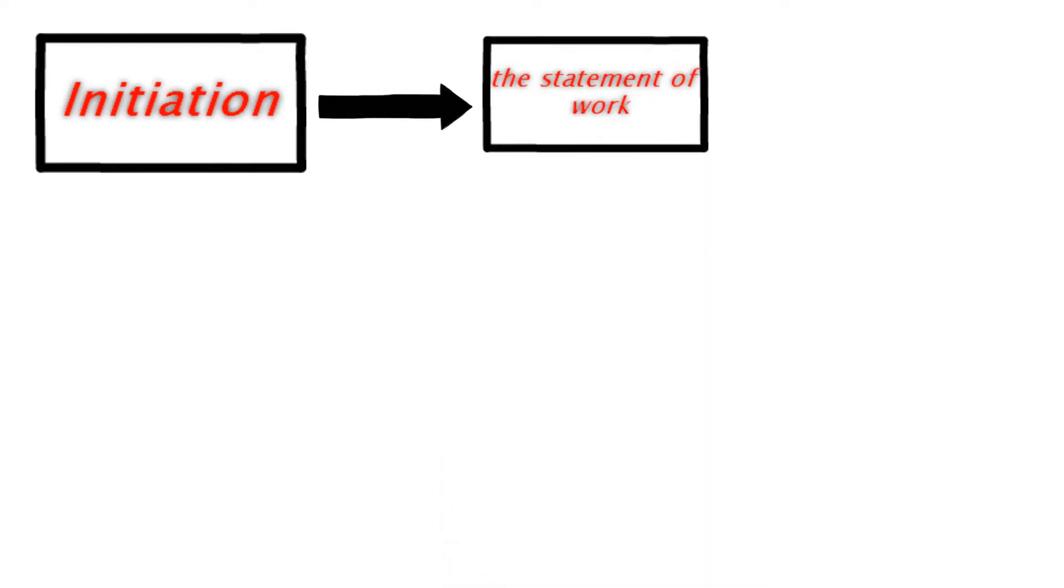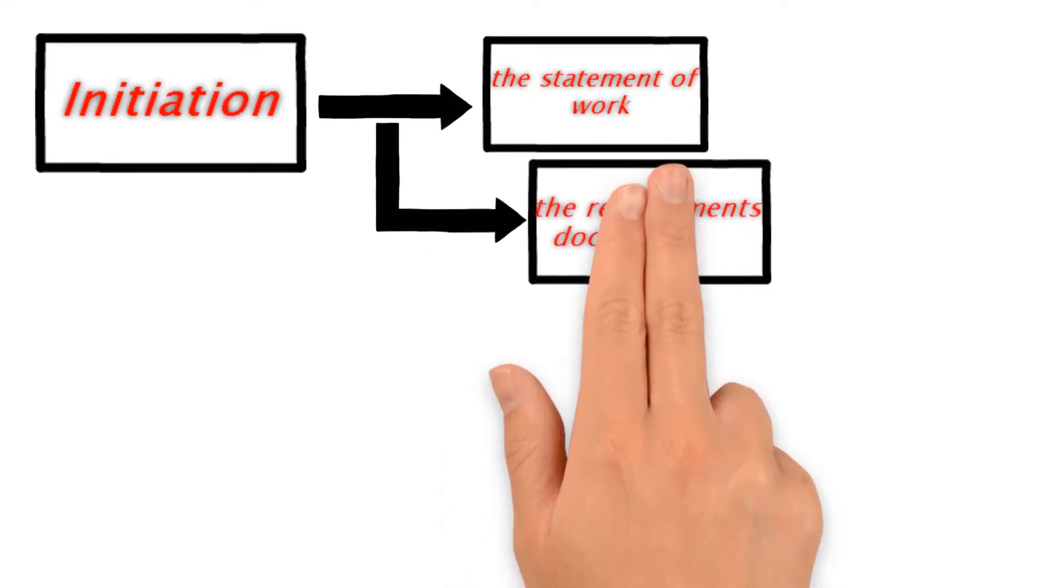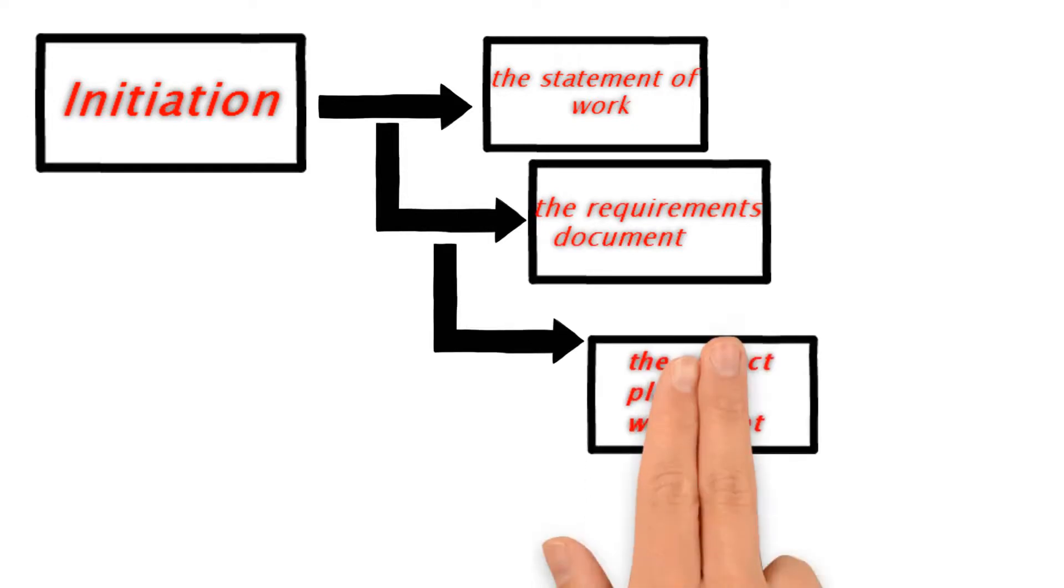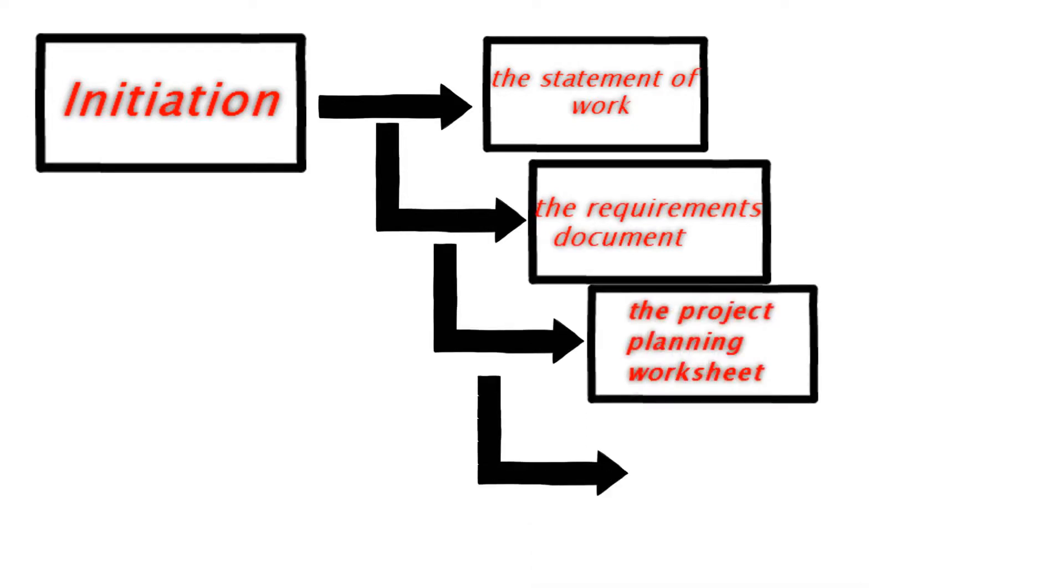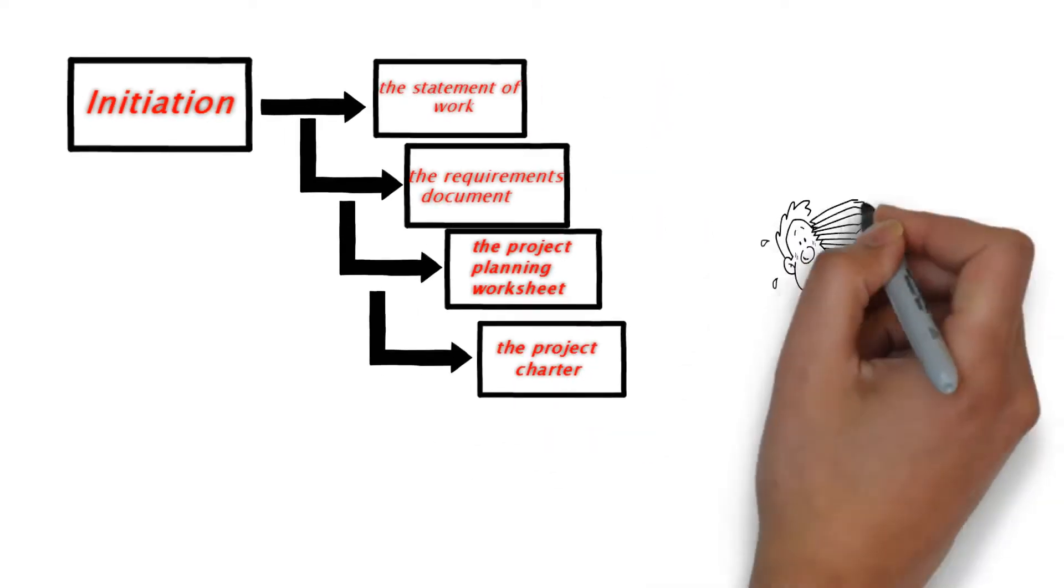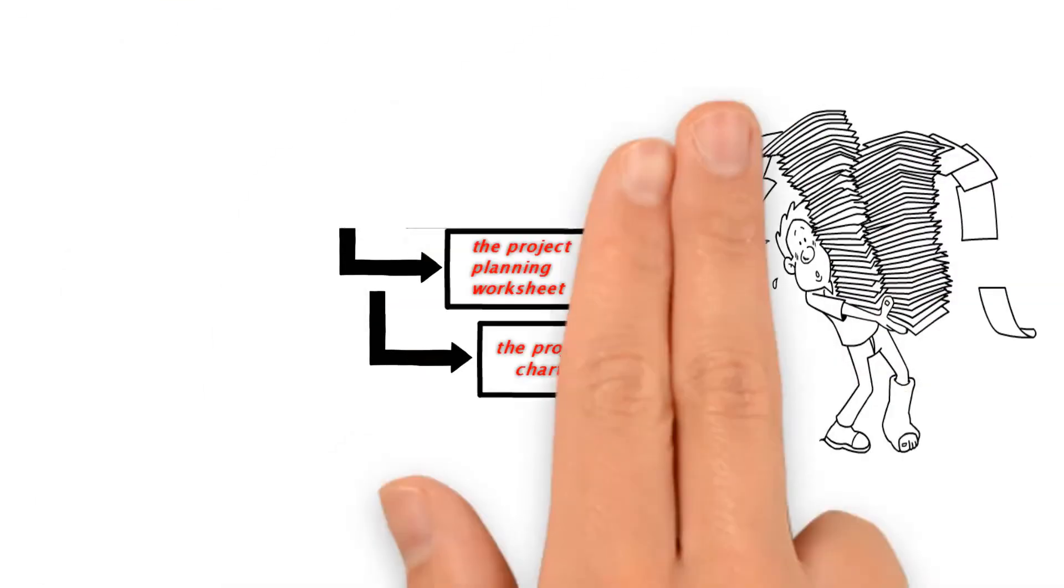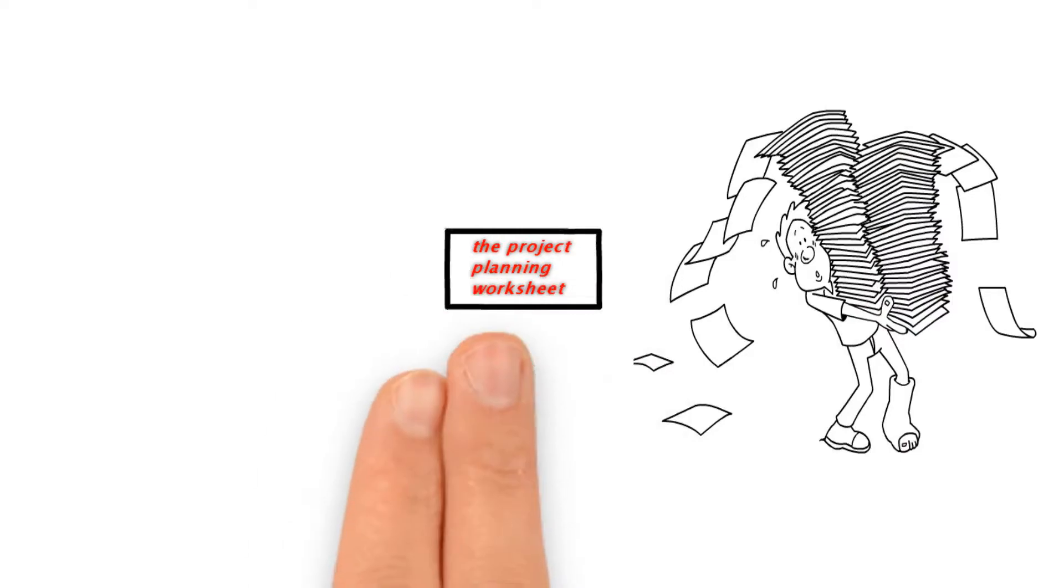These are the statement of work, the requirements document, the project planning worksheet, and the project charter. The statement of work defines what work will be done on the project and when it is scheduled to be done.